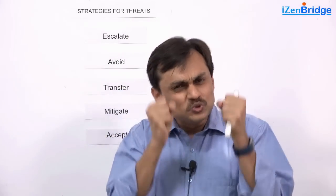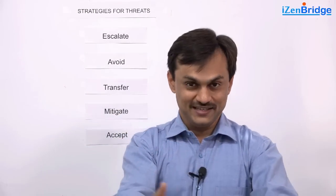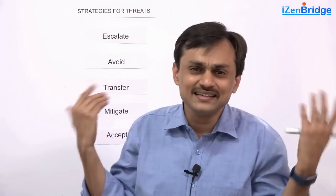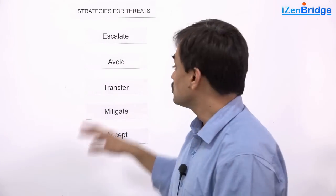Avoid. Avoid is something - let's remove the root cause of the risk. Let's live without this risk. Say you are going for a movie, there is a risk of not getting a space in the parking. So you drop the idea of going for a movie. There is no risk of getting a space for parking. The risk itself, the reason itself is removed.